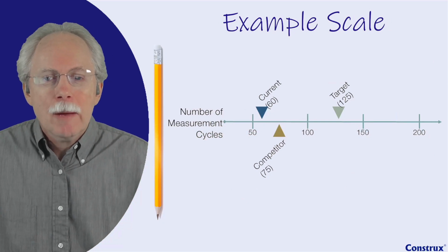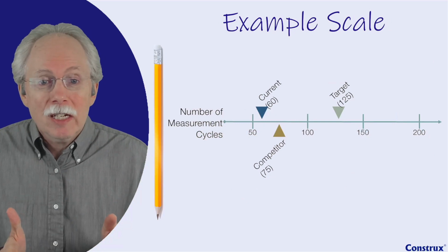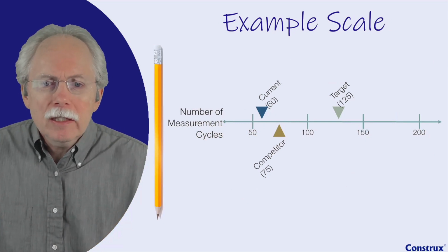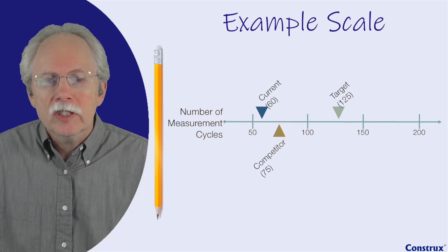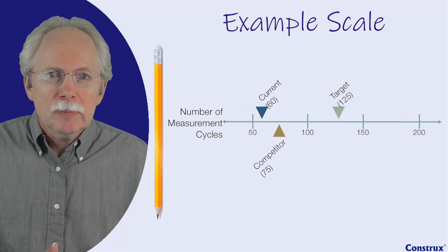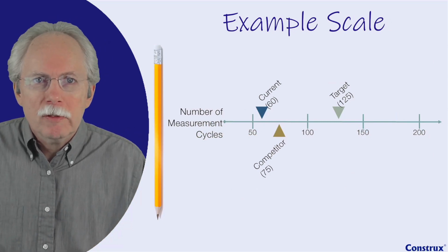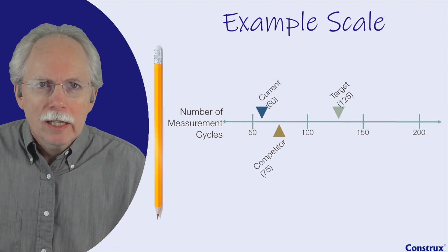And the product manager at that point said, it's out of my hands. The requirement said 125. You're only averaging 120. And so they appealed, and they had to hunt down a stakeholder that would actually have the authority to change that and say, okay, here's the situation. It was specified 125. We're averaging 120. Would you accept 120? Would you accept a change request for a requirement to say 120?